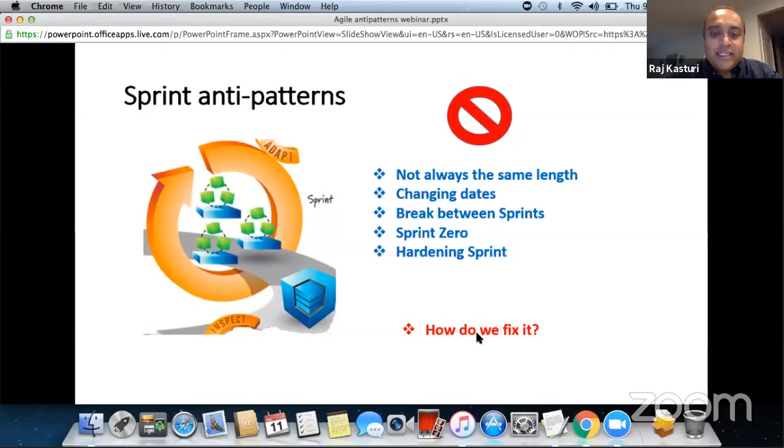What to do when the team has one story that is big and cannot be delivered in tasks? Then split the story, make it smaller. Always make sure there's coherent functionality, but a lot of people feel it's too big and we can't really split that. There's always a possibility, so give it a try. Talk to the product owner, and make sure it's meaningful.